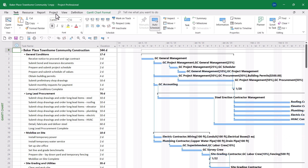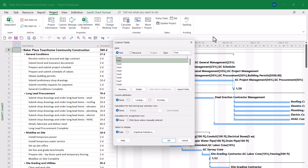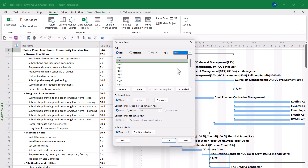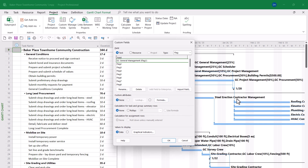First, click the Project tab to display the project ribbon, and then click the Custom Fields button. In the Custom Fields dialog, click the Type Pick List button and choose the Flag option. Select the first available flag field and click the Rename button. I'm going to make this field represent tasks that are assigned to GC General Management. Click OK, and that creates the first field.